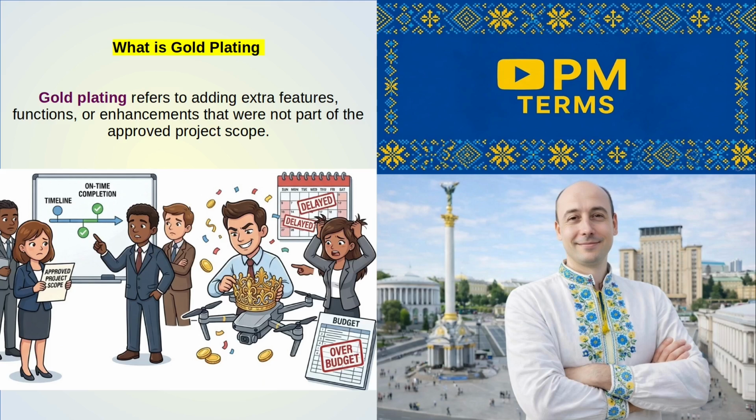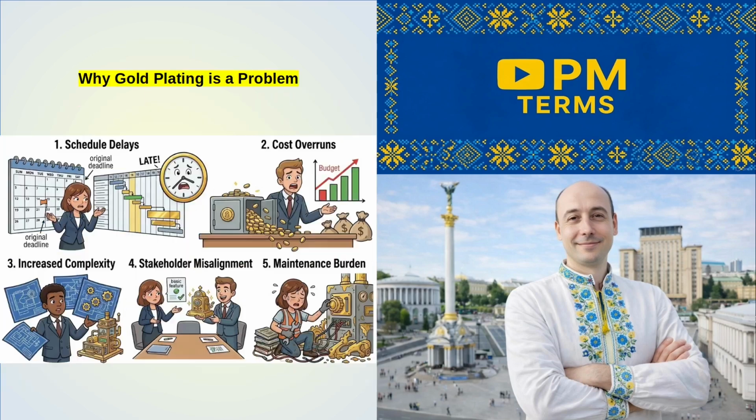However, gold plating is considered an uncontrolled change to the scope baseline. The key principle: if it's not in the scope baseline, it should not be done, even if it appears beneficial.